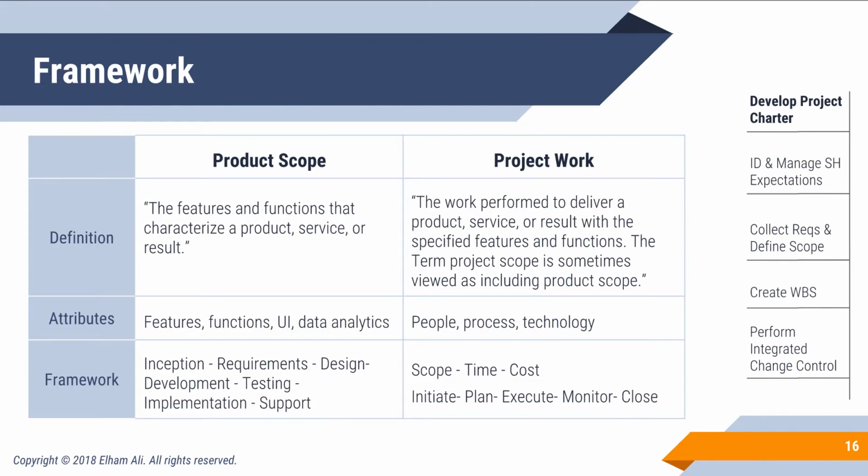one of the really interesting things about these kinds of frameworks is that it provides you with an idea of the size of the project. And it's a rule of thumb when we're doing rolling wave planning. That's when we really don't have an idea about what our requirements are. So we have to work incrementally as much as we can get information. And so these frameworks are extremely important because they give you an idea in terms of boundaries.